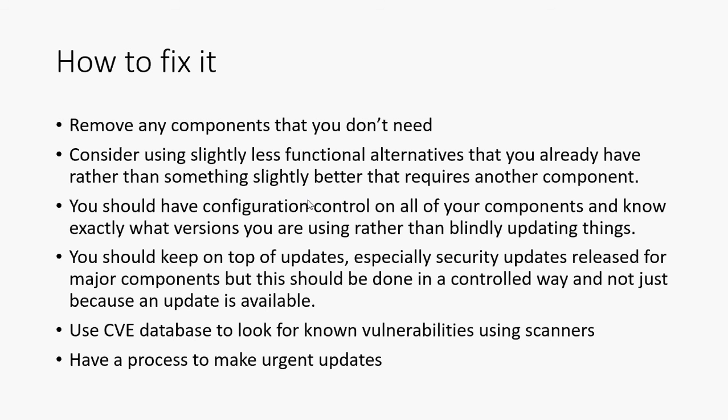Something many larger companies fail on: you absolutely must have a process to make urgent updates to your system. If Apache has a massive vulnerability, you can't wait six months for your normal software release process. You need the ability to say this is an urgent fix against the current code base — deploy it immediately, in parallel with normal development — without bundling in a load of other defect fixes that risk breaking other things. This urgent update capability must be part of your software management and change control process.